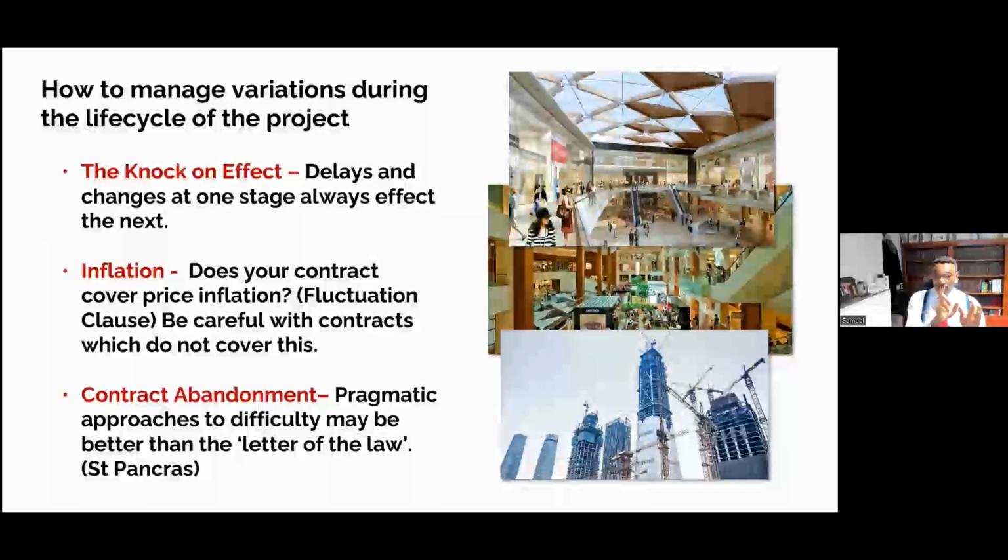Now, although it may be impacted by a delay, there may be a float already inbuilt in the activity that would enable you to absorb that impact without it affecting the critical part of your program, or it may not. As the case may be, if you recognize that it impacts your critical path, then you must immediately scream and draw it to everyone's attention, because unless you do, unfortunately, you will be the one alone bearing the consequences of it.